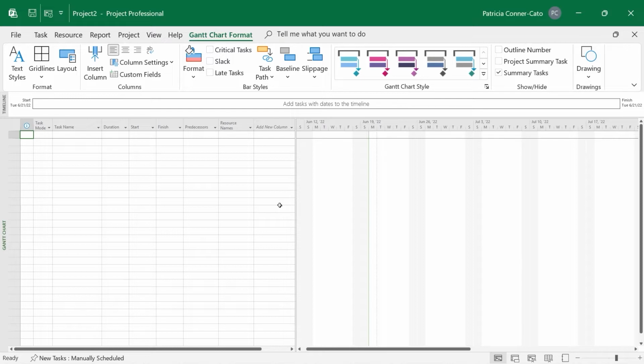After you've set a start date or finish date for your project, you're going to want to assign a project calendar. The project calendar lists all the exceptions, so days that no work will happen on the project. This is not like an Outlook calendar where you can import the holidays and stuff like that. You have to manually enter them.